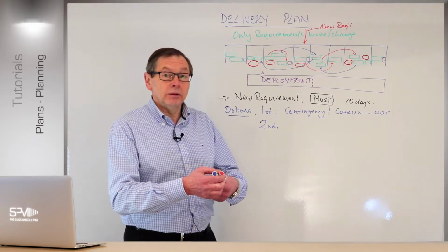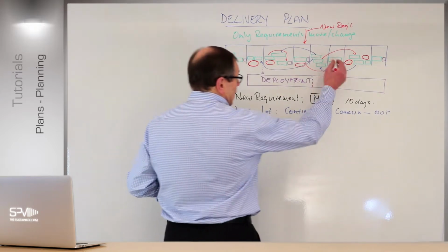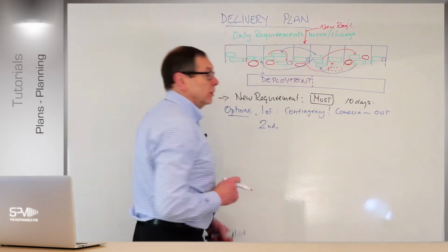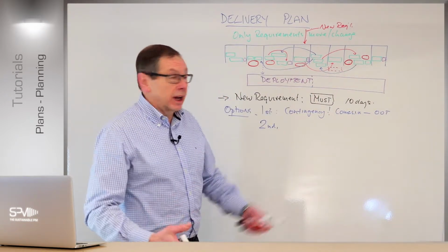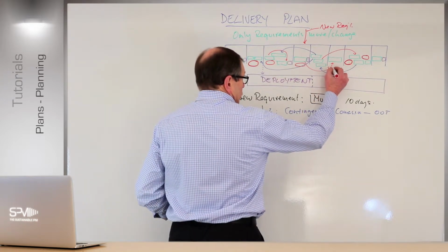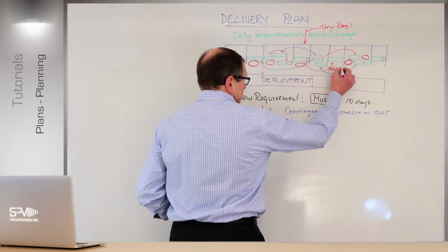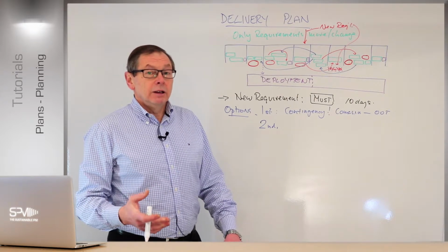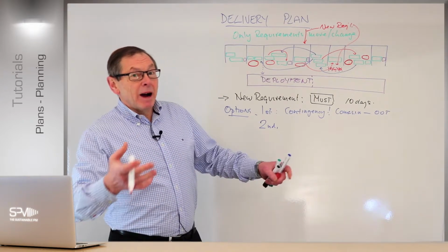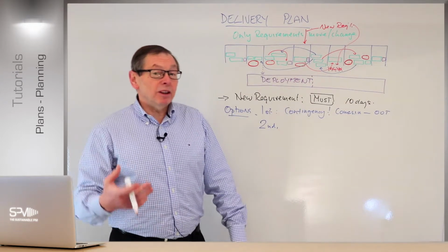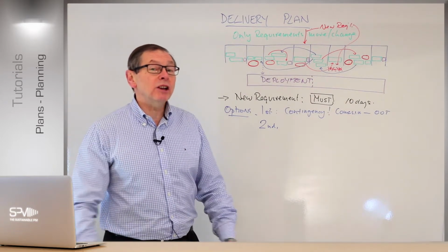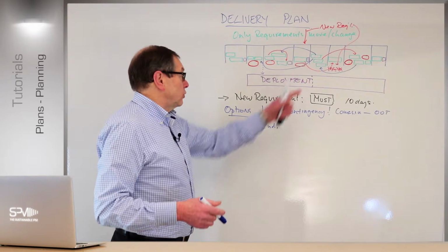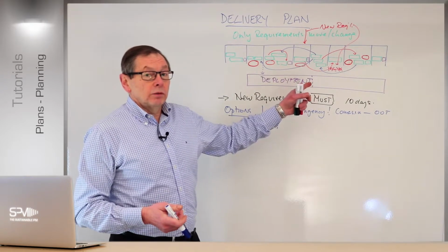We can actually add a time box somewhere, maybe, for example, here in this third to last increment. I might be able to put a time box in there to take up that extra requirement, right? So this will be the new time box. Now, it doesn't impact on the time, but yes, it impacts on costs. Well, of course it will, because now I need extra resources to take up that extra time box.